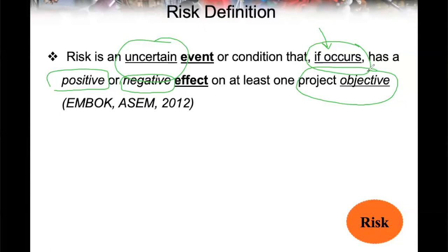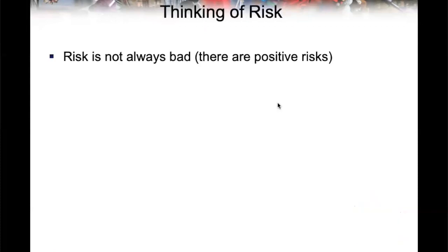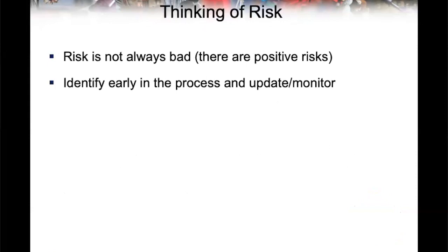We don't care about risk if it's not impacting our project objective. That's why risk is related to project management — anything you consider a risk should relate to one of your project objectives. If it's not, that's not a risk for you. So whatever your project objective is, you have to consider that objective to find out the risks. Identify early in the process — that's why the first step is risk identification.